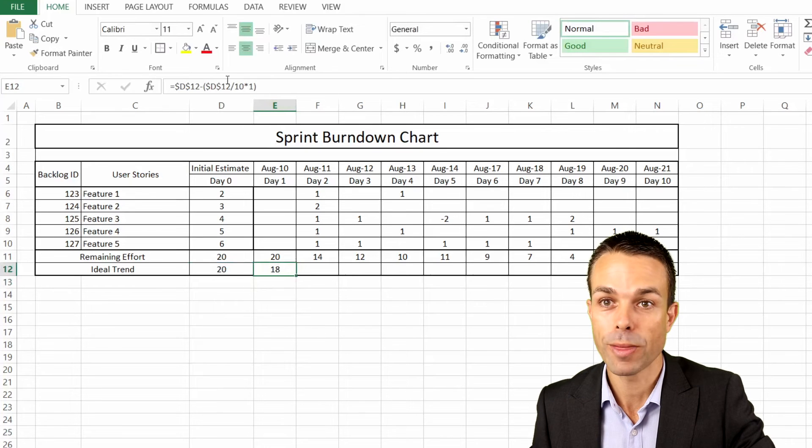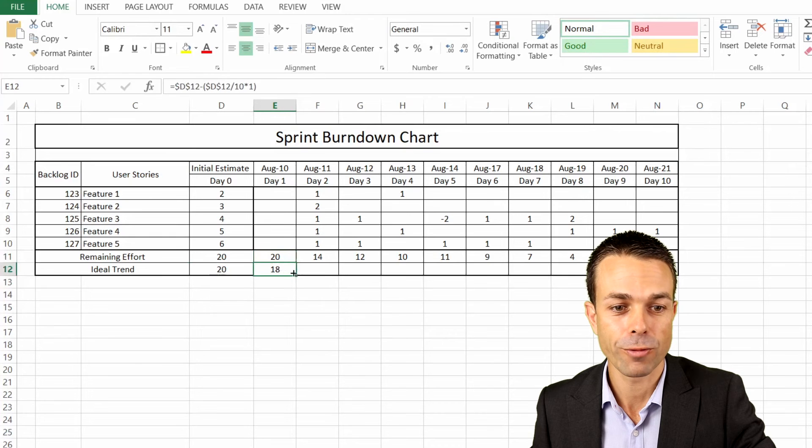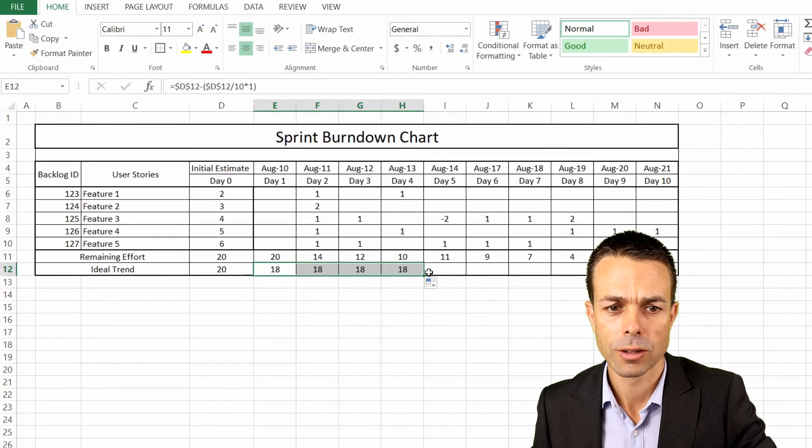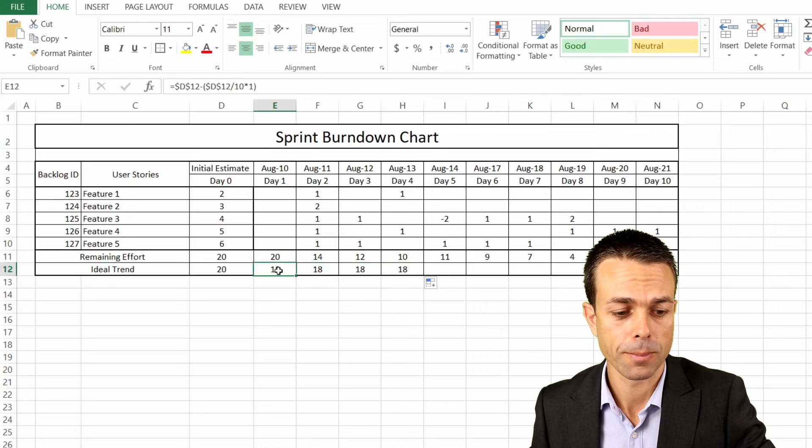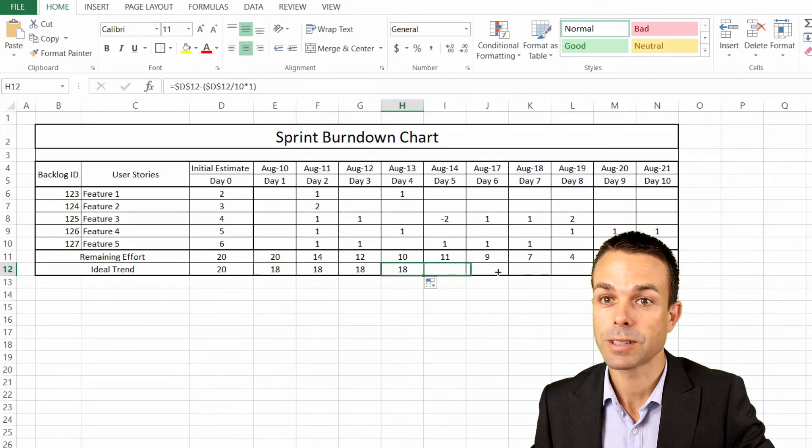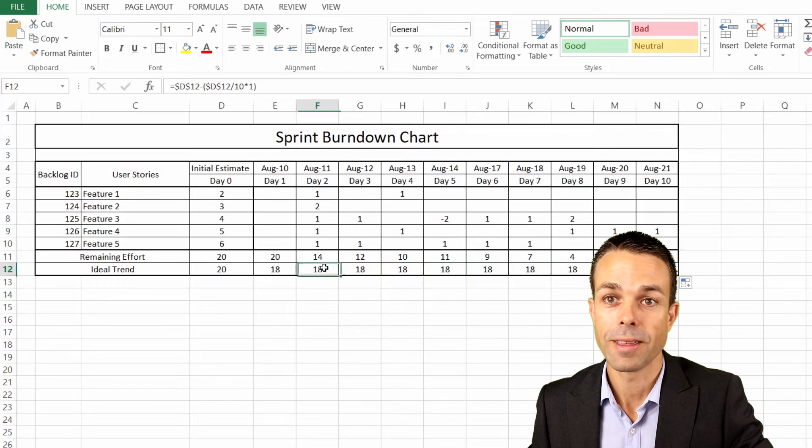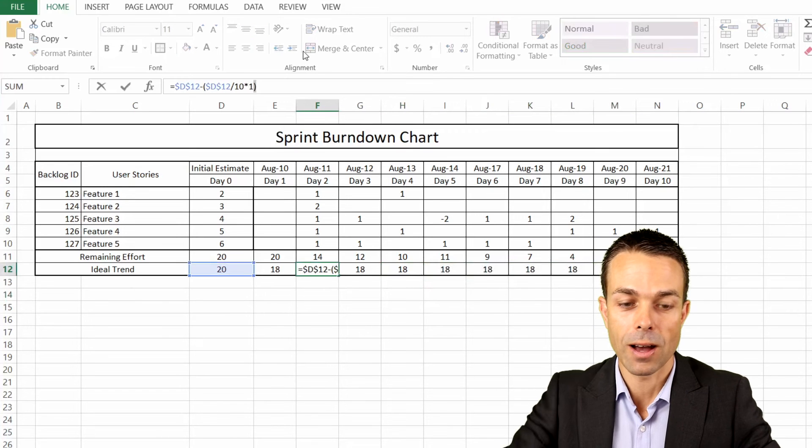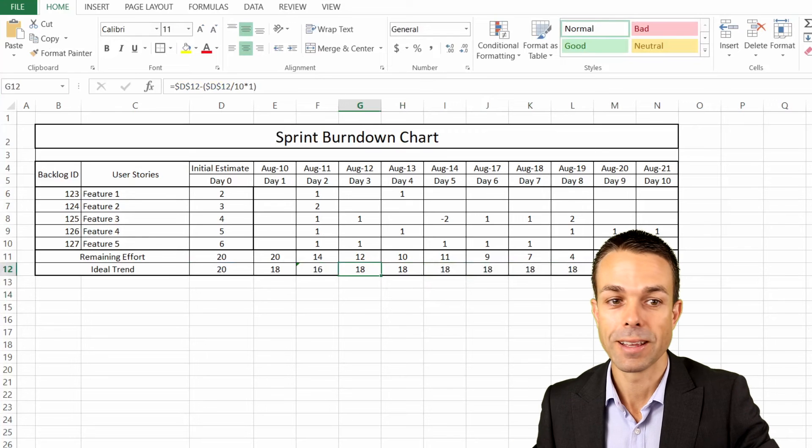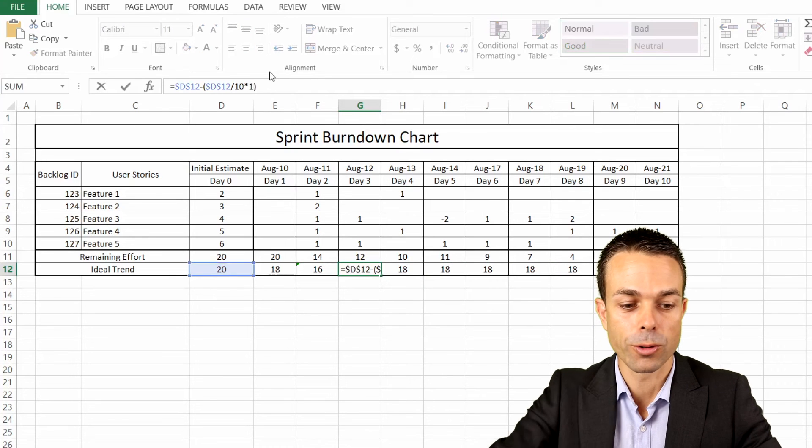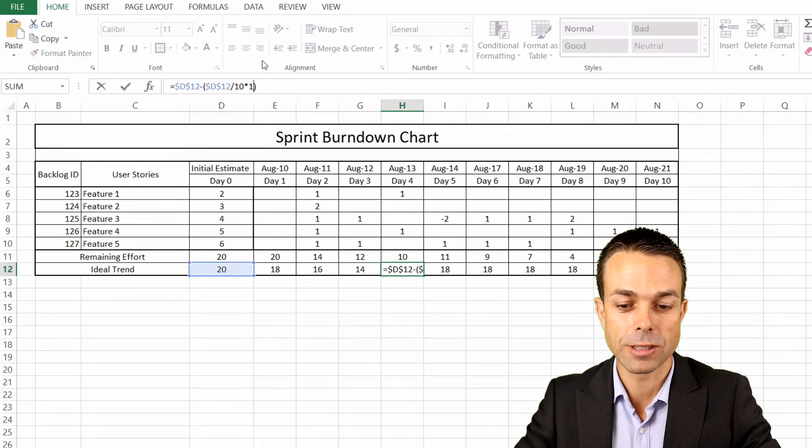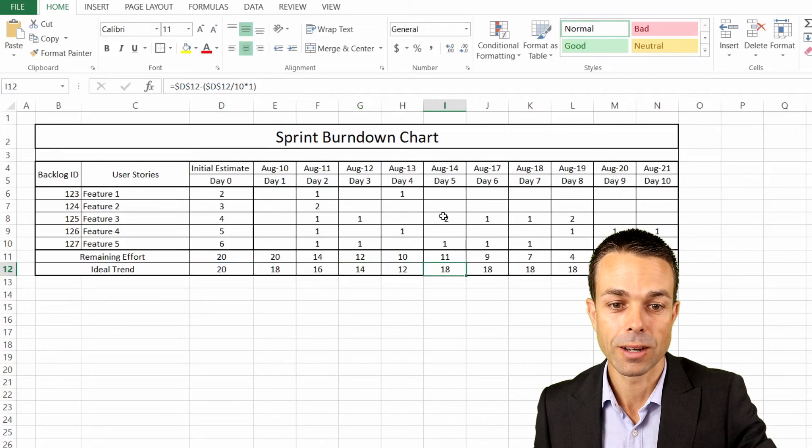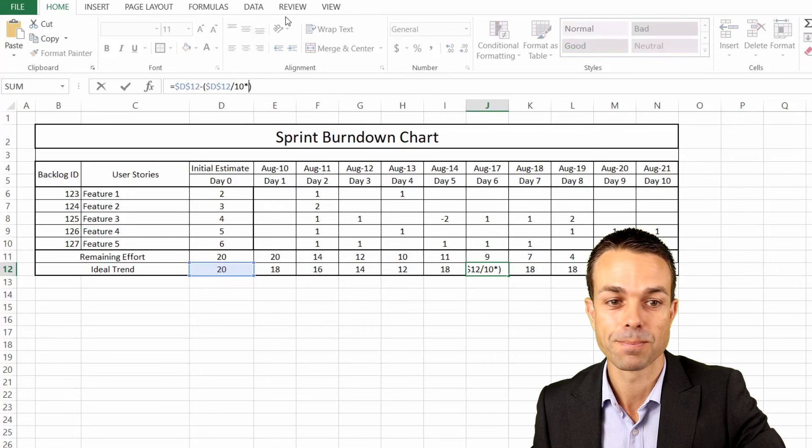So what that does is that gives us the 10% of our days. With that formula there, we can take that and let's see if that carries across. So that doesn't carry across, unfortunately. But if we do carry across that all the way to the end, then all we need to do is change our 1 to 2, and then so on and so forth, the 2 to 3, and the 3 to 4, all the way up to 10, so that eventually we're taking away 100% of the 20 days.